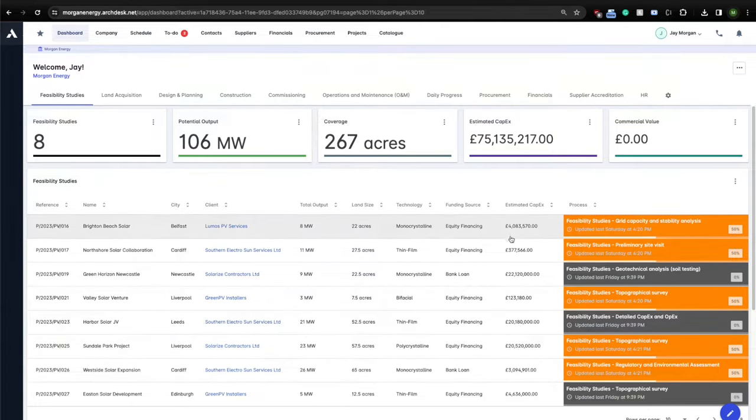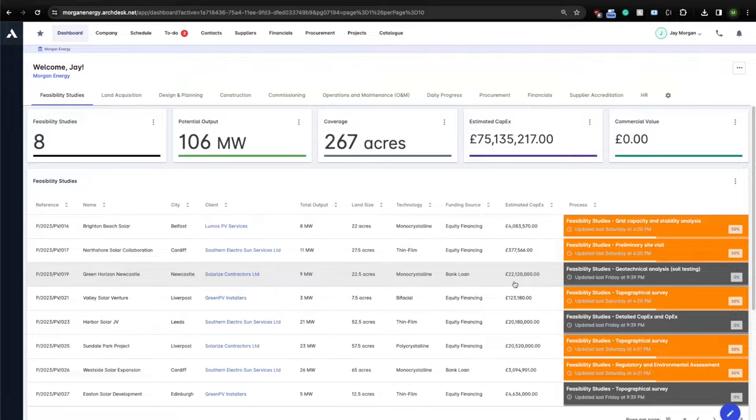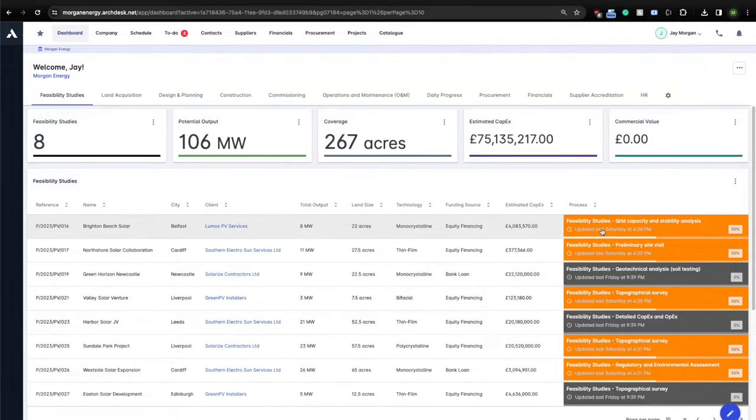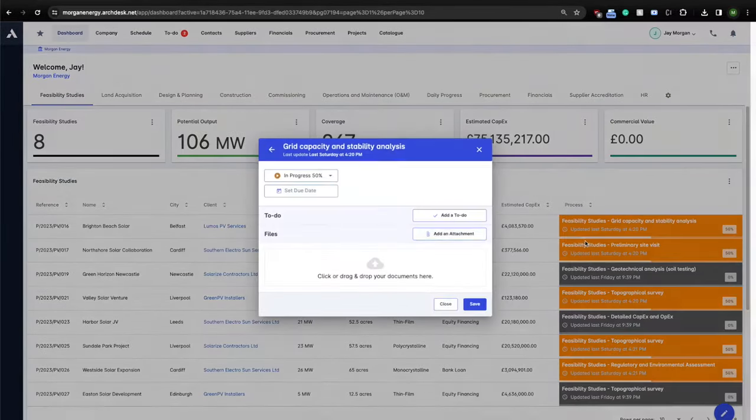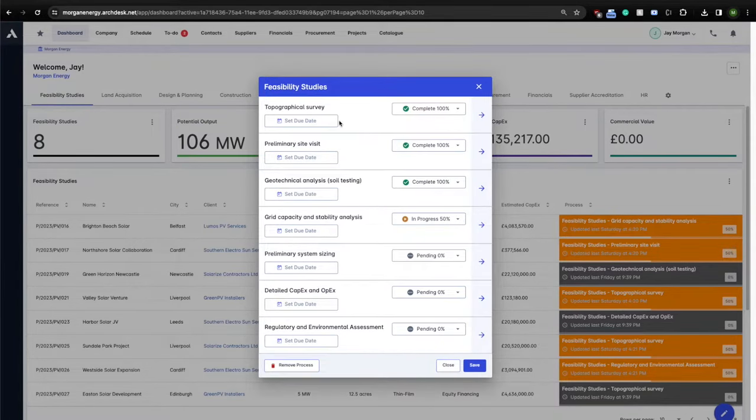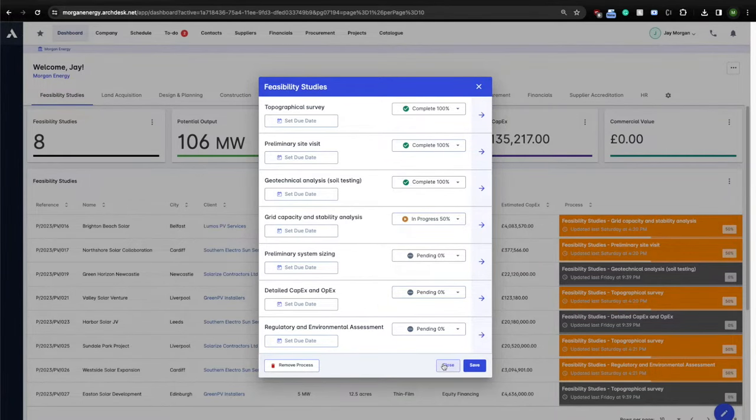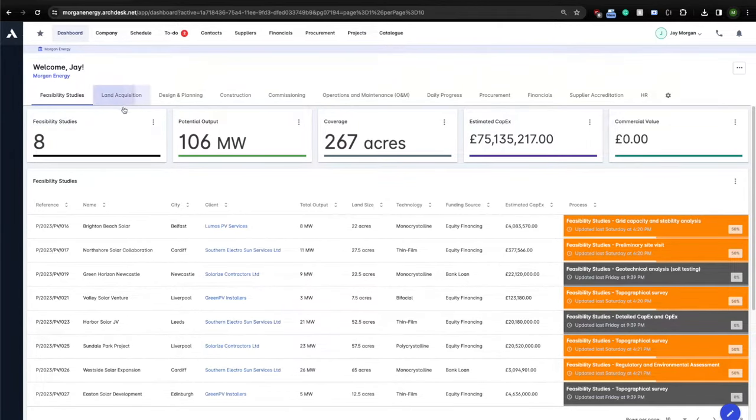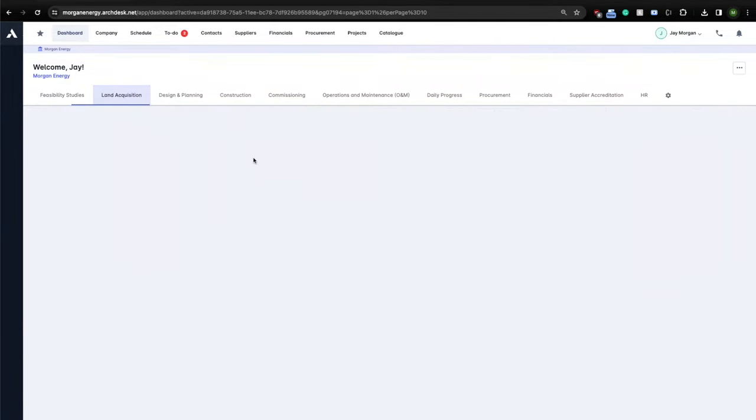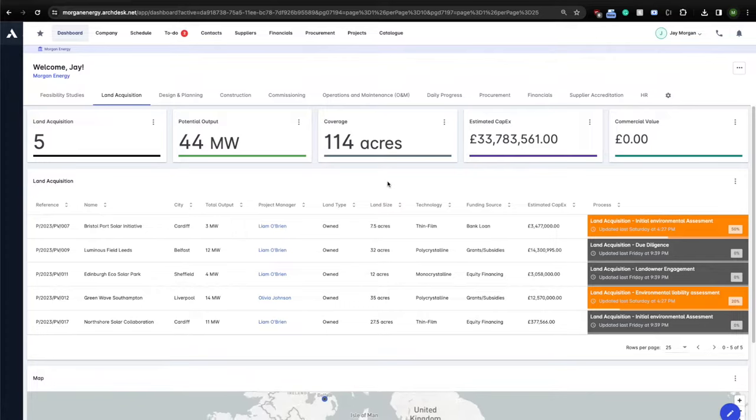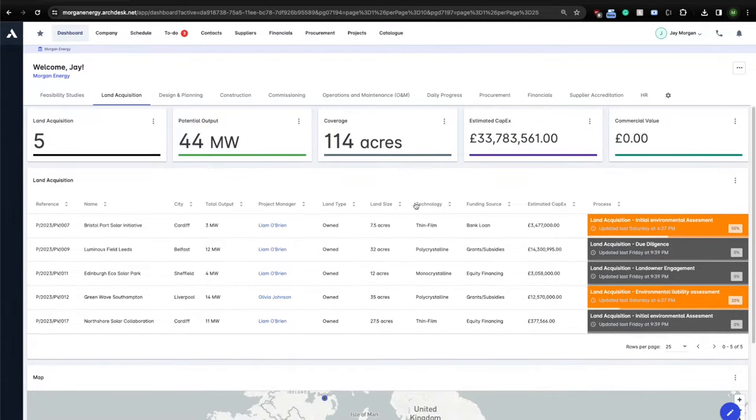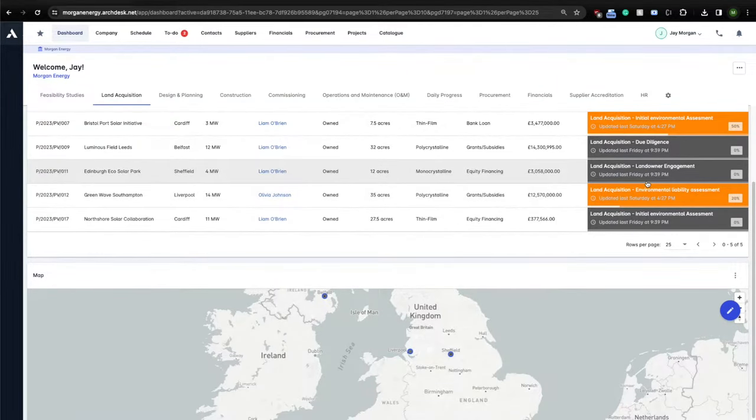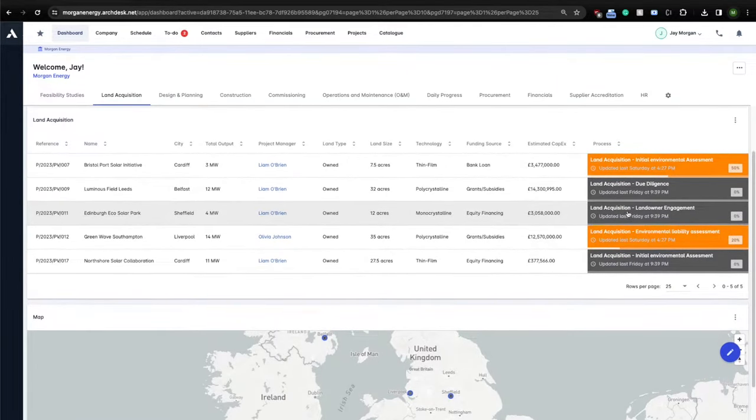This account is set up so that every new project first needs to go through feasibility studies. We can see there are currently eight active projects in this phase. We can click on any of these processes and learn about the steps we need to take to advance this project to the next relevant phase. Once that's completed, the project would automatically move to the next relevant process. In this case, the land acquisition.